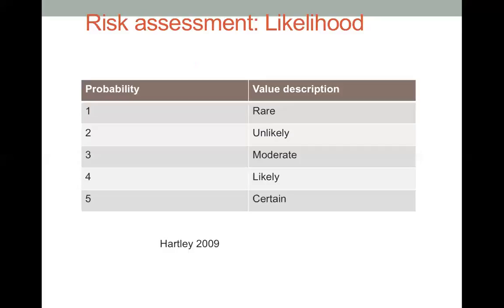For instance, if we are launching a new product and one of the risk events may be the shipment of our raw material or packaging material, then we can ask our stakeholder, what is the likelihood this supplier is on time? Well, the likelihood is quite high based on the track record, based on our learning. They're quite reliable, for instance. So that's likelihood.